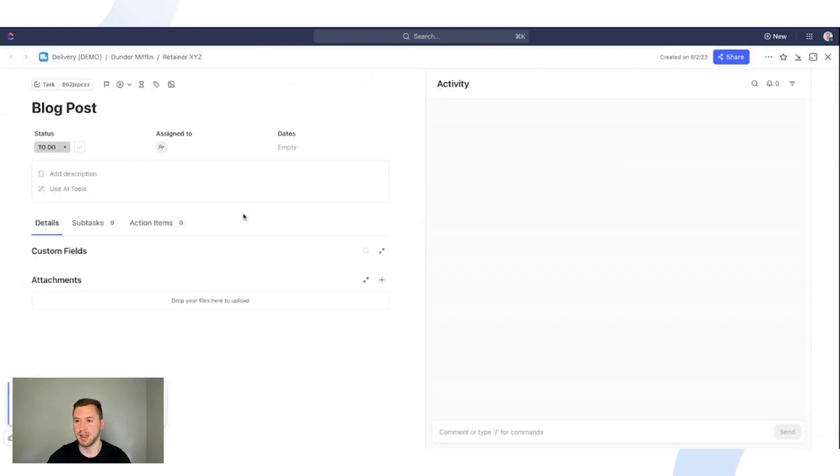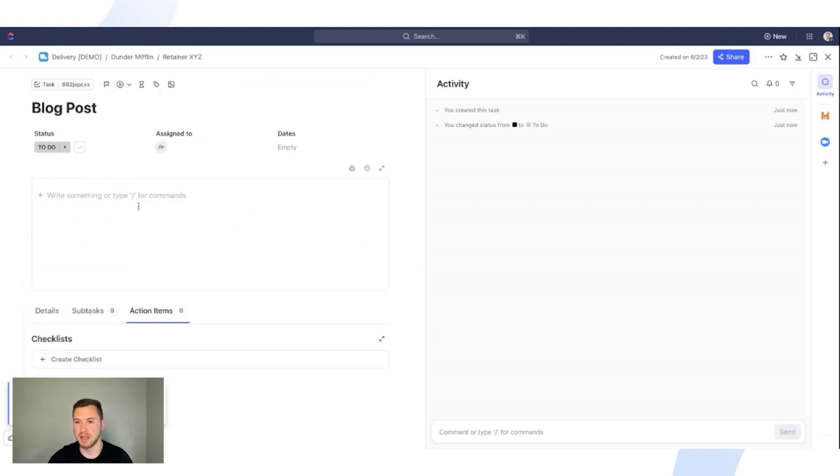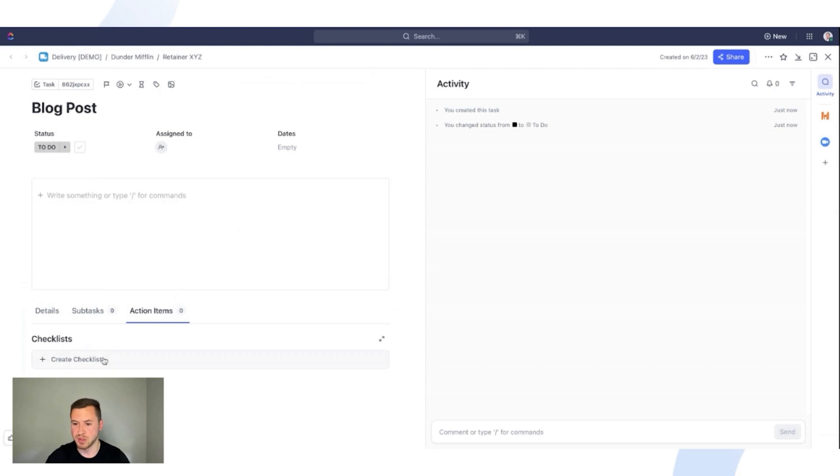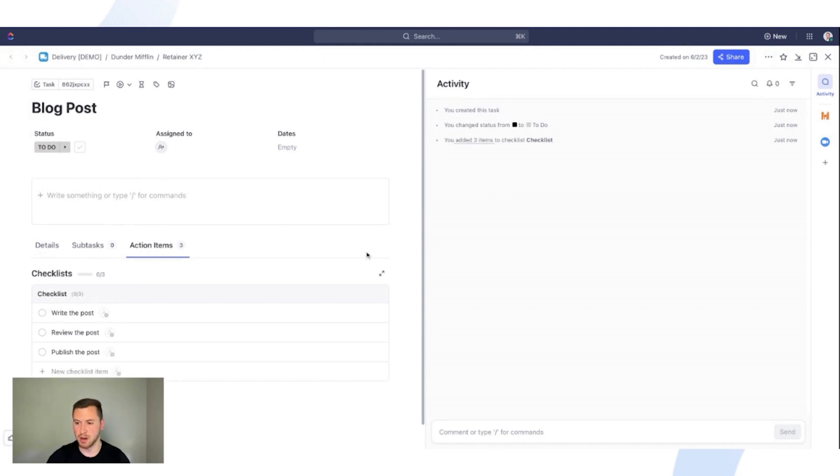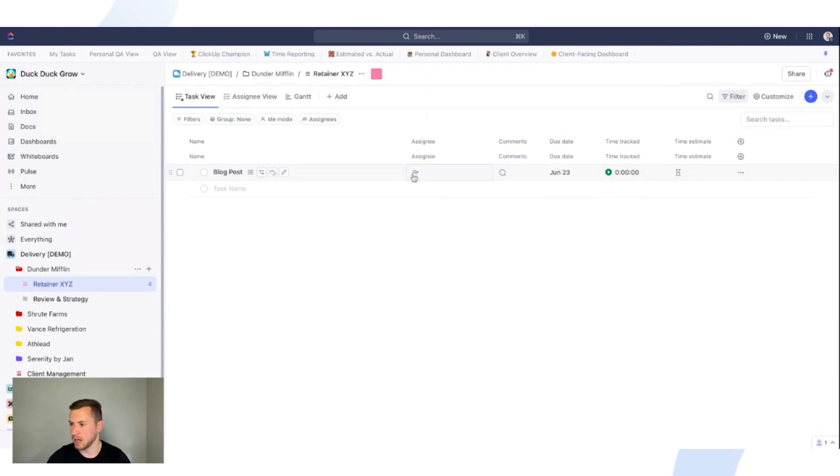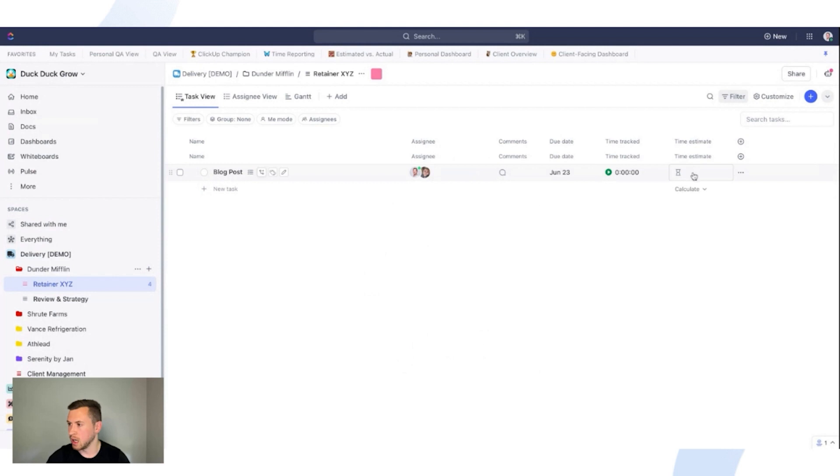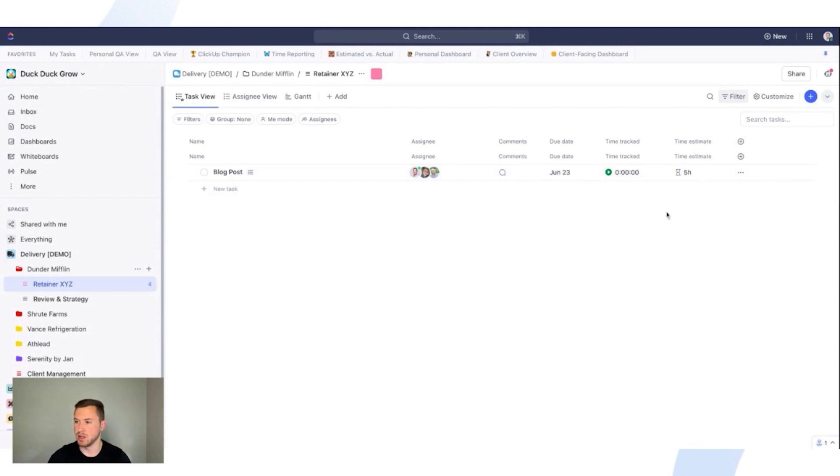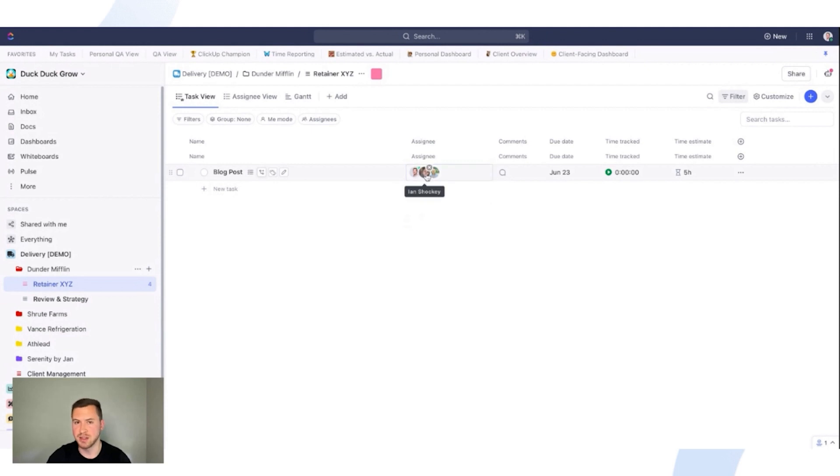And maybe you're like, I think we need to add some details to here. So maybe on this blog post, you add a task description of what we need, what Michael wants. You put some action items on here just as a checklist of, okay, we need to write the post. We need to review the post and maybe we need to publish the post. So that's what we have. That's really all that we're going to get. It takes some time for me to set this up. Maybe I'm like, okay, this is going to be due on the 23rd and I'm going to assign this to myself. I'm a part of this project. I'm going to assign it to Ian. I'm going to assign it to Andrew. And the time estimate, I think it's going to take about five hours, maybe longer than that, but I'm not really sure. So that's oftentimes where people start off at and just having multiple assignees on here, that's where things can really slip through the cracks because I don't know if this is really assigned to me. Ian doesn't know if it's for him and Andrew doesn't know for him.